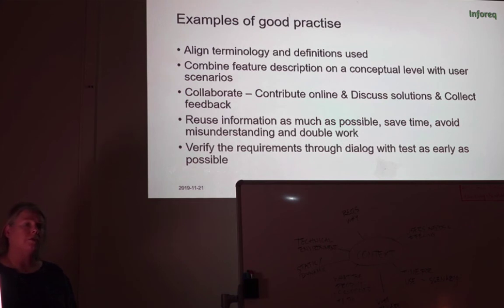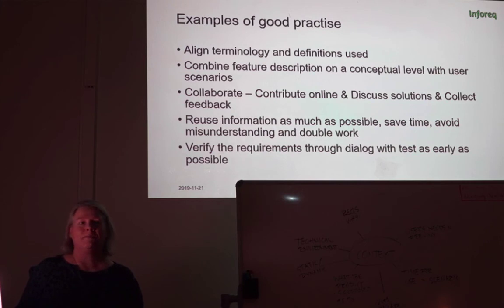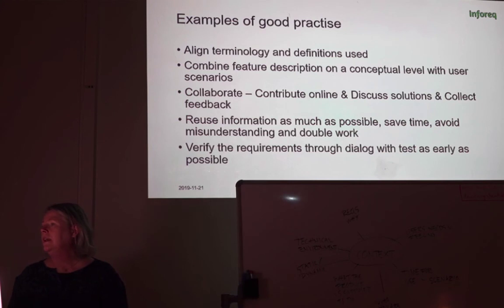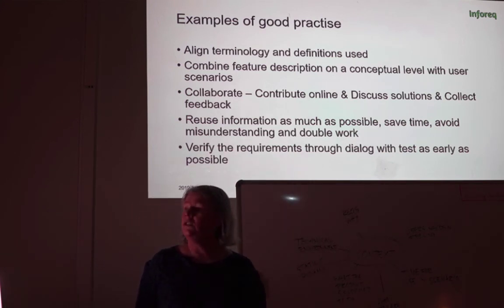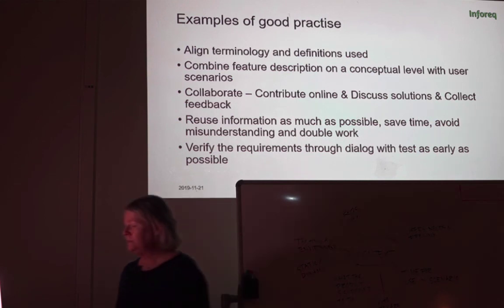And I think it's good to verify requirements early with test. There was a project manager recently who asked me, why should we involve tests right now? It's not their job to review requirements. And then I said, it's better that we know if the requirements are verifiable now than later, because then we will lose speed if we wait for it later. And he accepted that.